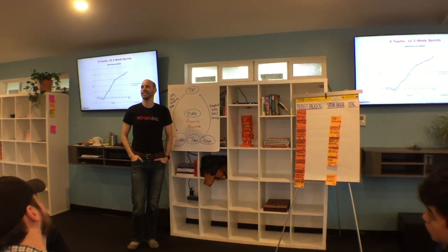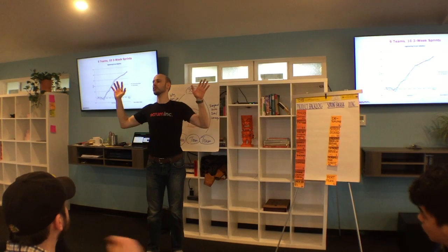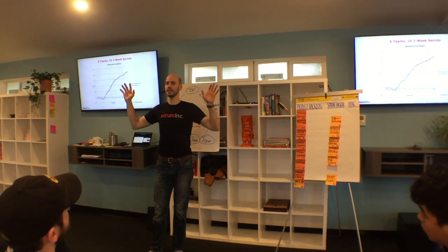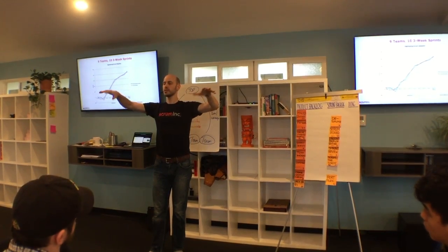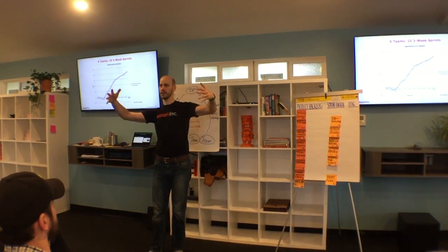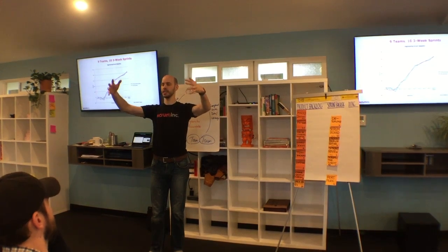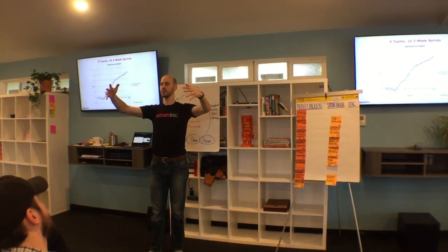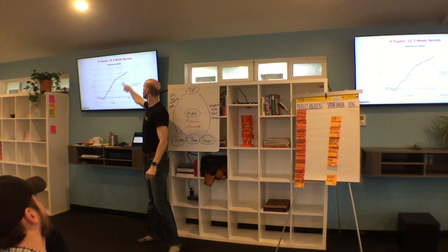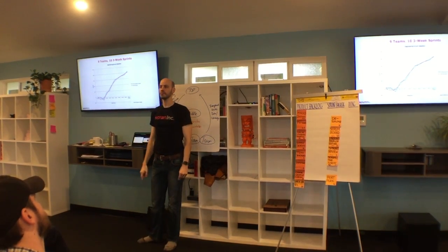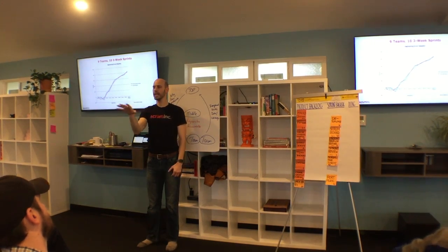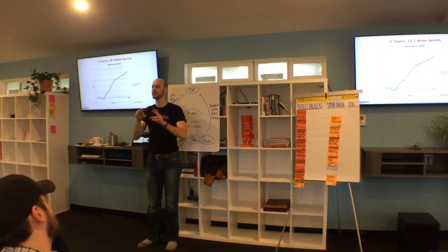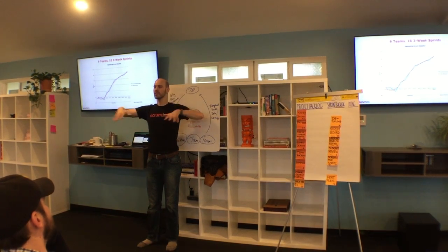So one 16x team didn't magically clone more 16x teams. But making that team's work highly visible to as many other teams as they could, and the most that they were able to geographically get within earshot and eyesight of the team was 9. It did pull them all up to 4x. So one hyper-productive team made visible, put on display, not breaking up the team, putting it on display, solves or self-coaches other teams around them.